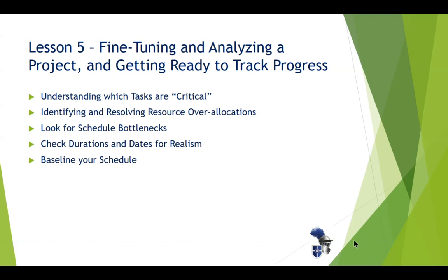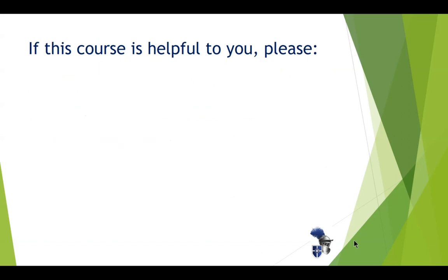Once we have our own confidence as the scheduler or project manager that the dates work and that we can really have confidence that we'll meet the target dates, then we'll look at how Project can baseline for us, how we can capture those dates so that inevitably, as we start delivering, some things take longer, some things take less time, and we have to change plans, we always have a good understanding of what the dates were that were approved in the first place.